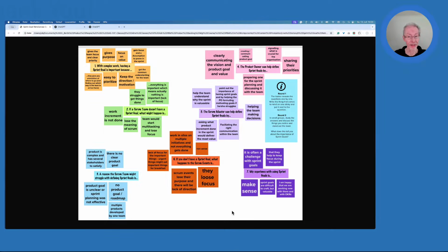Just as a brief reminder, sprint planning works in the following way. The product owner brings the business objective to the sprint. What's most valuable the team could accomplish over the course of the sprint? Then, collectively, the Scrum team agrees on a sprint goal, taking everything into consideration: their capacity, who is there, are people joining, people leaving, do they have all the tools, are there any dependencies, are they skilled in the area they're supposed to work in, etc.